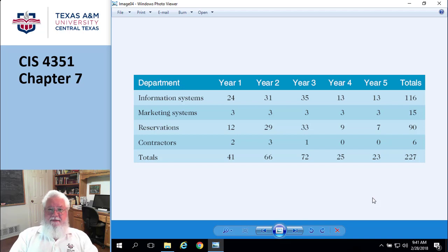In this case, they already have some WBSs in mind. They're going to track the costs by month. That's because that's how they want to set it up. They're going to allocate their costs by trade. Remember, not by person. Whereas here's a designer, and here's a programmer, and here's a database person. Whatever it is. And so by actual trade craft, you're going to purchase the devices. You're going to have to remember to include the licensing fees for these things. These things are going to require some sort of testing, so you need to include that.